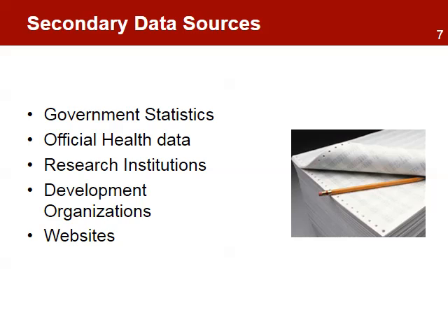This is the data that has been collected to meet a specific objective or purposes that may be different from the project. Secondary data may be more cost-effective or may be the only option available when primary data is not practical. When secondary data is identified, the project manager should be cautious about the quality, reliability, relevance, credibility, and validity before using it to track the performance indicators. If the data is of good quality, then the use of secondary data can represent a significant savings in both cost and time for the project.